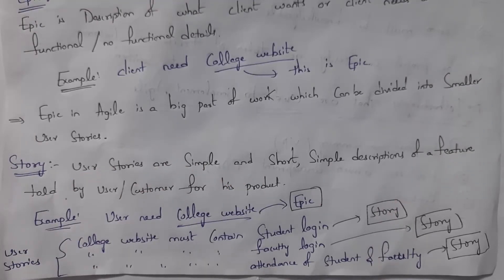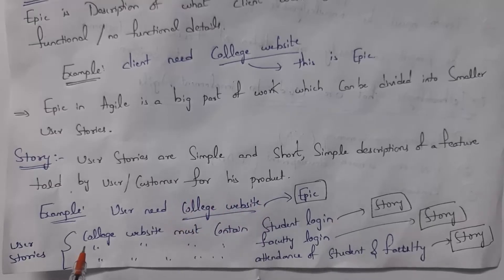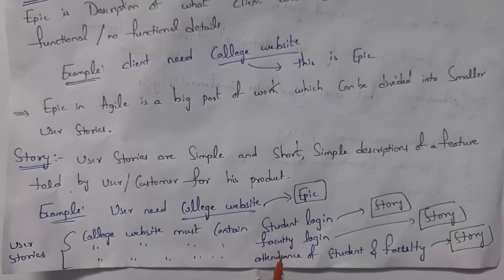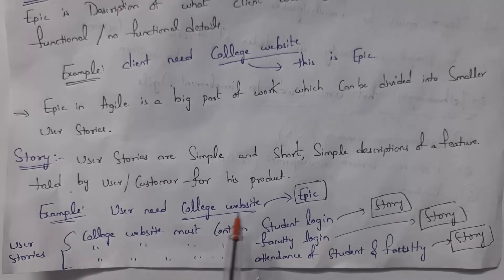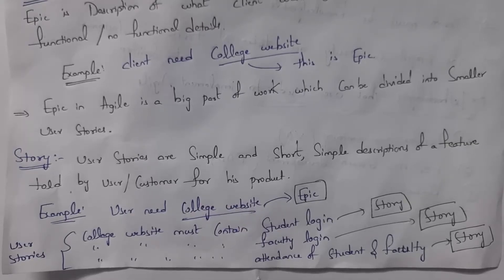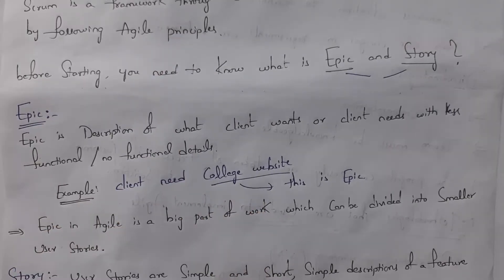User stories are simple, short descriptions of a feature told by customers or users. For example, if the client wants a college website, that is the Epic. Within it, features like student login form, faculty login form, student attendance, faculty attendance, student marks, and student results are each considered one story. So an Epic is big work divided into smaller stories, each story representing one feature.